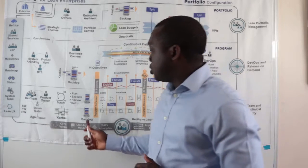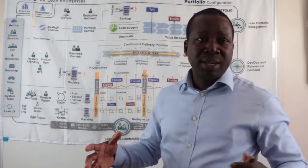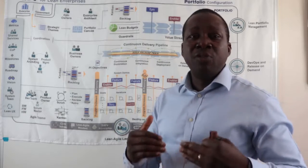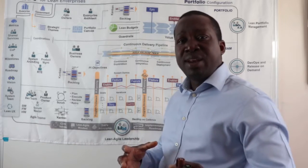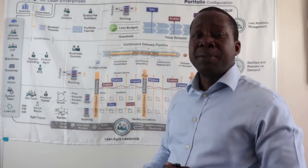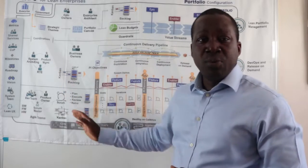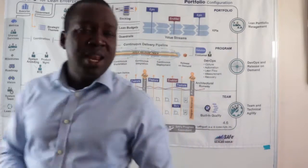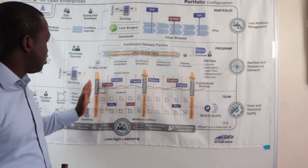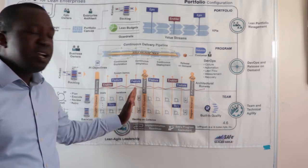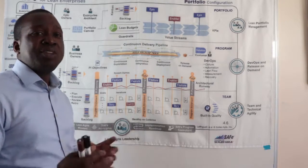We are also considering our Program Increment Week. The Program Increment Week is a two-week period where we've got time for innovation and then time for planning before we go into our two-day planning. We have planning readiness before we go into our two-day PI planning, and these are events coordinated by the Release Training Engineer with support from the Scrum Masters. Iterations are driven by iteration goals that the teams will set at every iteration planning event.